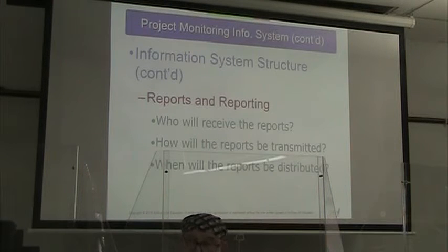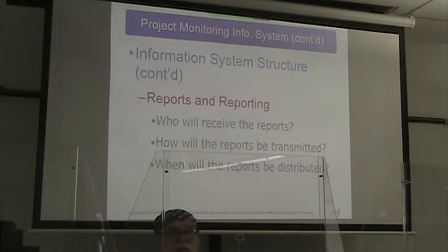And when are we going to distribute them? Very often we'll have a weekly report which is very much a summary of what is going on with the project, and then a monthly report which is much more in-depth and detailed.